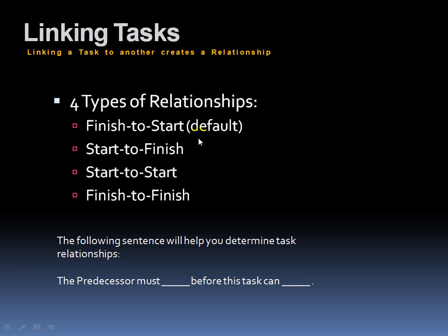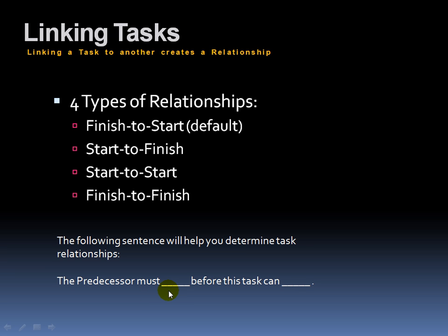You have a finish to start relationship, which is the default relationship in project. Then start to finish, start to start. Basically, none of this means anything right now until you come down and read this little sentence right here. This will help you determine the task relationships. So when you connect your task, you're going to ask yourself, the predecessor or the task before this one that I'm looking at must what? Before this task can what? For example, the predecessor, the task before this, must finish before this task can start, which is probably the easiest concept of a relationship between linked tasks, as I just described a minute ago.